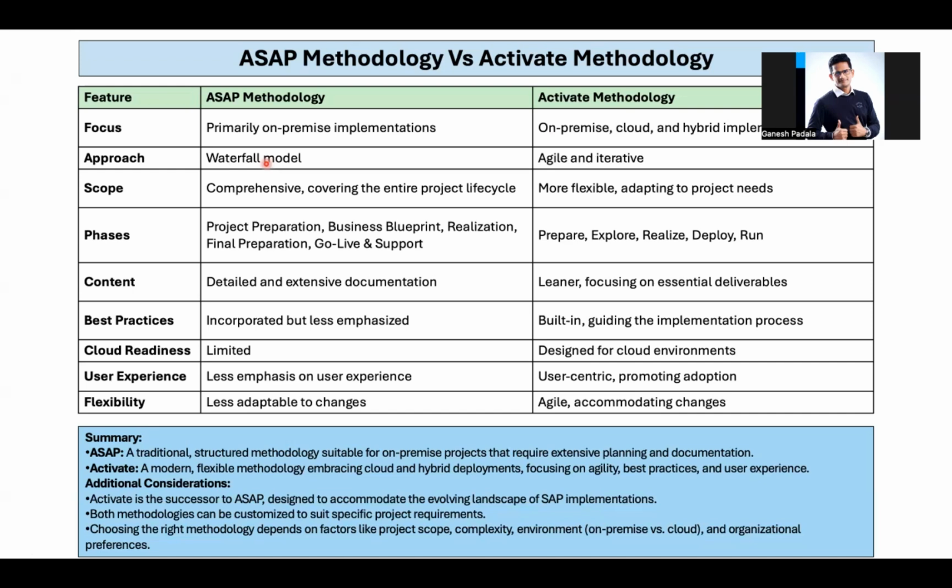Similarly, in agile they put it under a proper name: sprint. For example, the entire realize phase will be split into some 5 or 6 sprints. Project management also tries to ensure that each sprint does not cross 1 month so that the deliverable can be seen, and each sprint will have activities and deliverables.